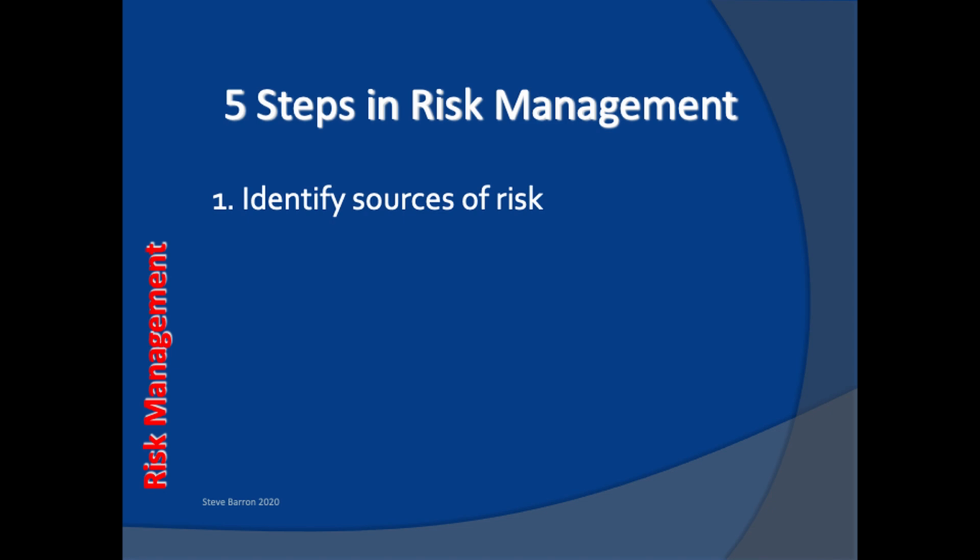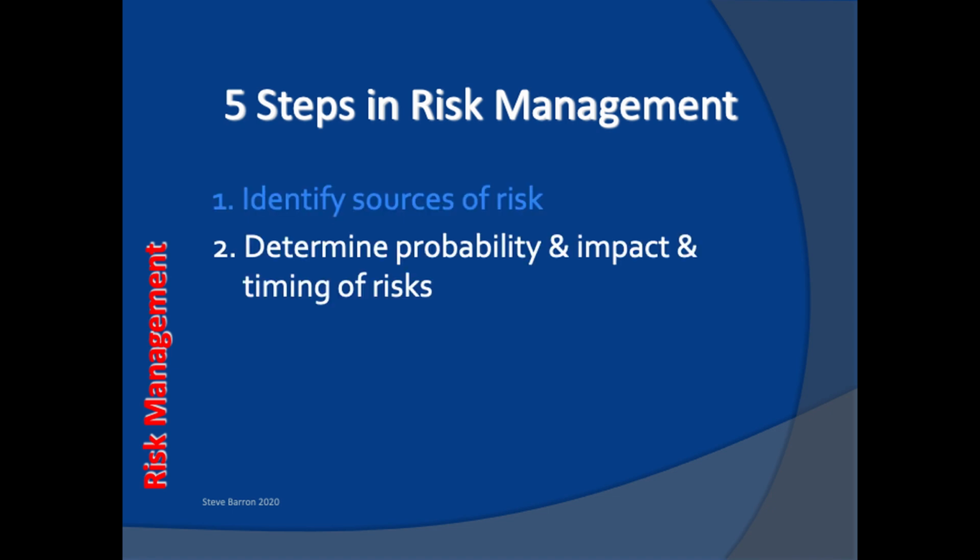Identification of risks might reveal a large quantity of risks, sometimes many thousands. Unless we have sufficient management effort available to manage a high quantity of risks, risks must be prioritized through a process of assessment. The first stage of risk assessment is to consider the potential damage done to the project if a risk was to occur. This is called the impact of the risk.